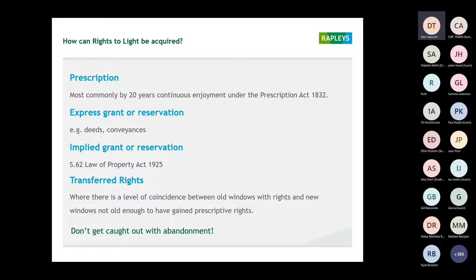How can these rights be granted to buildings? By far the most common is the Prescription Act from 1832 — 20 years of continuous enjoyment of light through a defined aperture. However, I would regard the critical number as 19 years and one day, because there is a way to block it via a light obstruction notice, but that process takes a year. So at 19 years and one day you haven't got a year left to run. Buildings in London near Bank with lots of glazing are now coming up to 20 years — definitely something to be aware of.